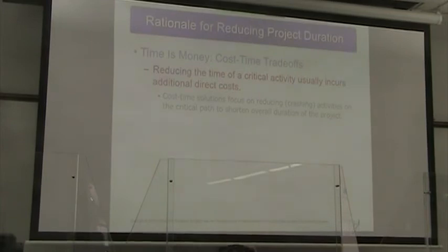And that's true, especially when we start talking larger sums of money, such as the amounts that have to be committed to projects. Right? So when we have to reduce the time of some critical activity, that almost certainly incurs extra direct cost.